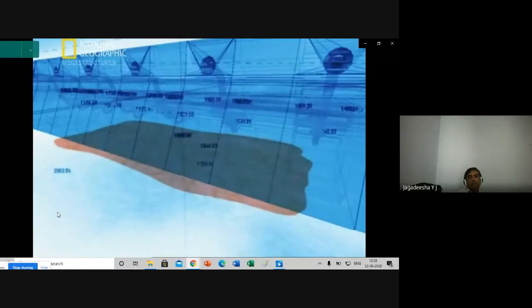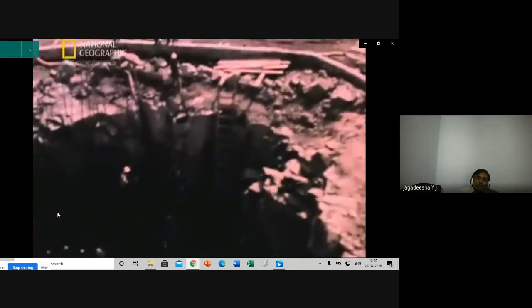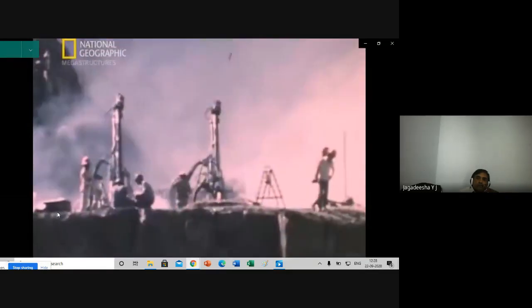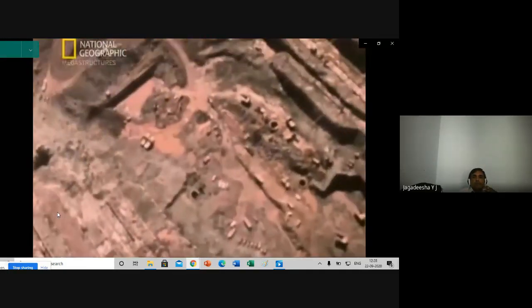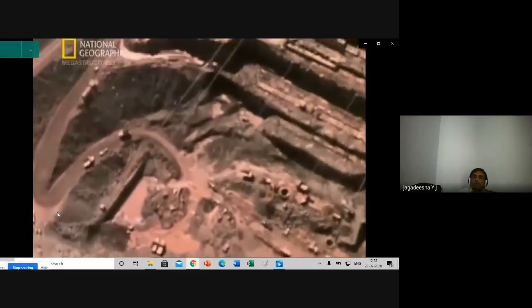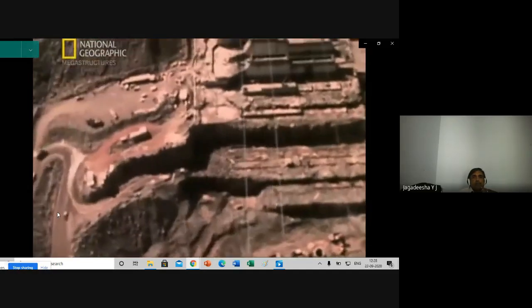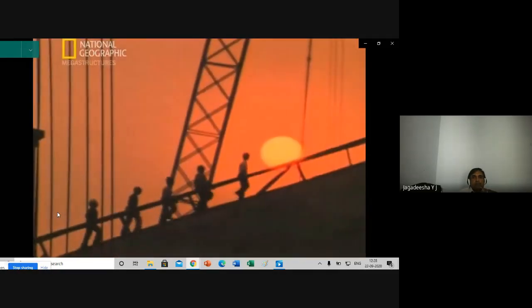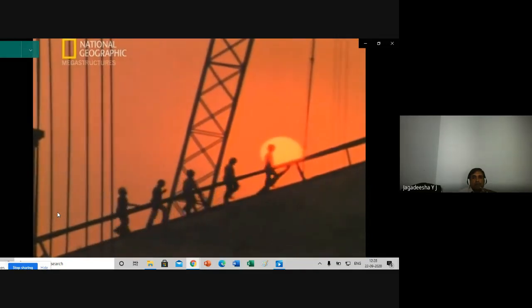Like demonic dentists, the engineers drilled out the decaying rock and gave it a massive filling with extra strong concrete. It did the trick, but the extra work took months and added a further £10 million to the budget. Fixing the crumbling rock layer threatened to delay the whole dam building schedule. And the relentless heat of the Brazilian sun was about to give the engineers another headache.